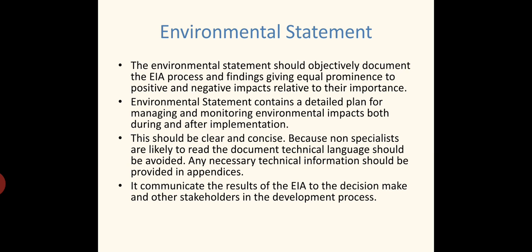Environmental statement contains a detailed plan for managing and monitoring environmental impacts both during and after implementation. So that is very important. This should be clear and concise because non-specialists are likely to read the document. Technical language should be avoided. Any necessary technical information should be provided in appendices.